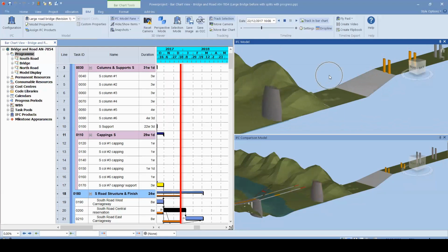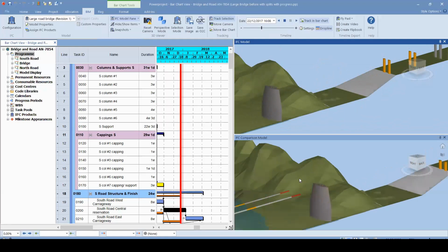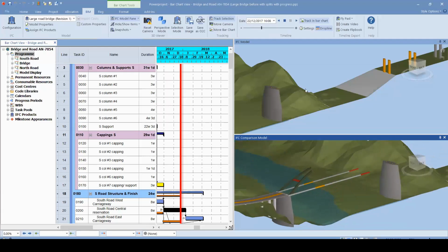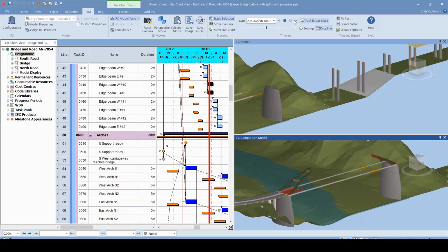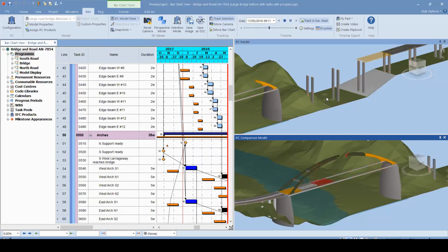The visual above is the live project status, but according to our baseline schedule, it should be like this. This direct distinguishing allows us to put all the differences in our reports. We can know how we are delayed, or we can create strategies to catch up to our baseline.